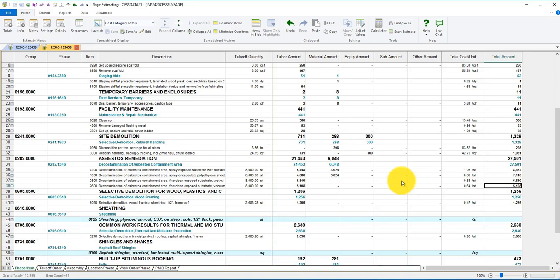But even when the spreadsheet's expanded to the detail level, the subtotals, or what we refer to in CESS as overline totals, are turned on all the time, whether your items are expanded or collapsed. Now, these totals are always here. The checkbox just determines whether they're turned on and you can see them, or they're turned off.